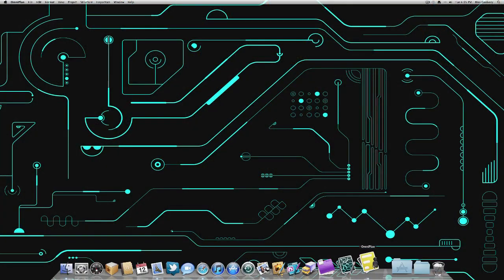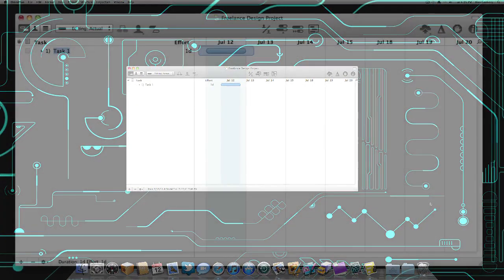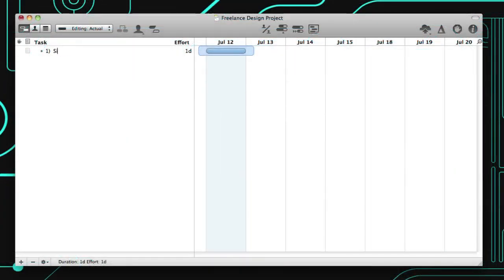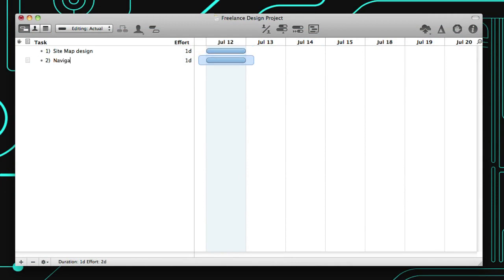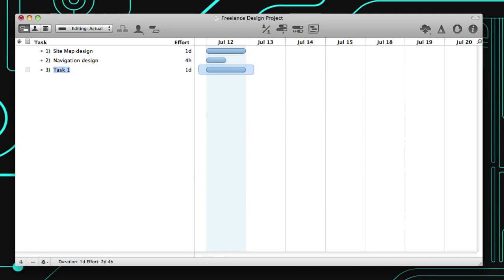When you launch OmniPlan 2, you can outline tasks immediately simply by pressing Return. Each task in the sidebar corresponds to a bar on the Gantt chart in the main window. Tab over to the next column to adjust a task's effort. Whether it's one day or four hours, effort is how much work time it takes to complete a task.